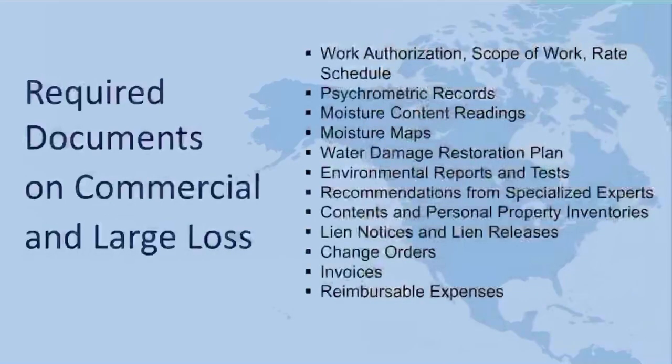Some of the required documents on commercial losses, on pretty much every commercial loss that you go out and do, probably residential is all, but the first thing you need is a work authorization or a contract, could be referred to. Your contract or work authorization has to include a scope of work, and it has to include how much you're charging or a rate schedule.